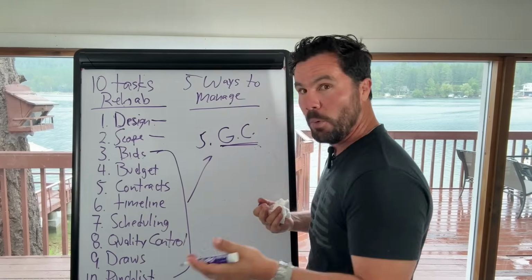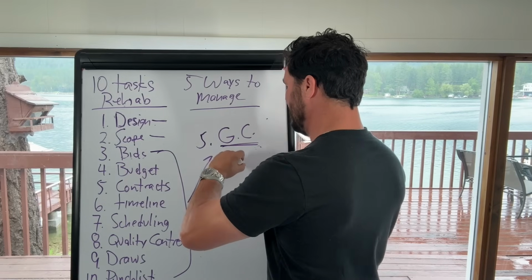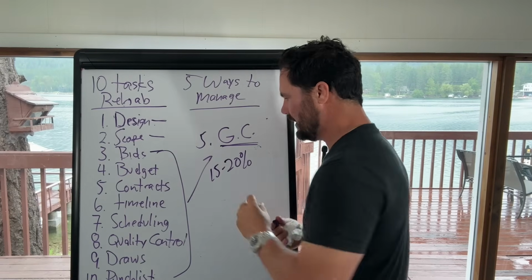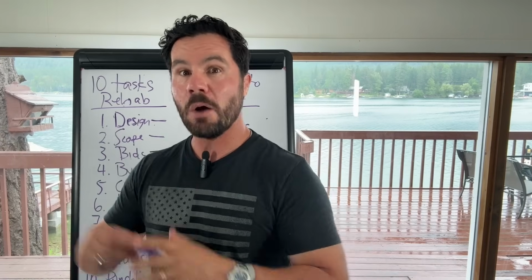Well, you're going to pay a lot more. Like a GC, you're going to be paying maybe 15 to 20% more to outsource the GC to manage the entire project. So what does that mean? It just means you budget it in.